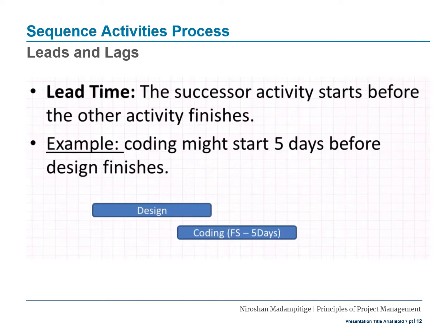So as the figure indicates, the design goes until this particular point. So your coding starts 5 days prior to finishing the design work. So the lead time is the overlapping time, that is 5 days.